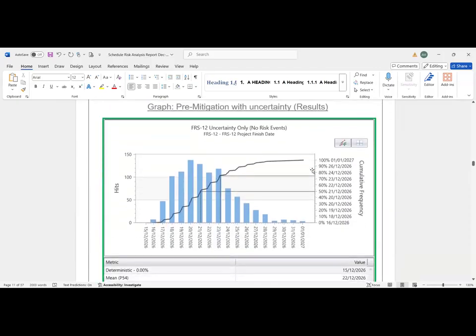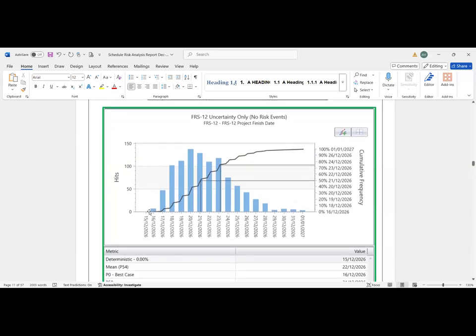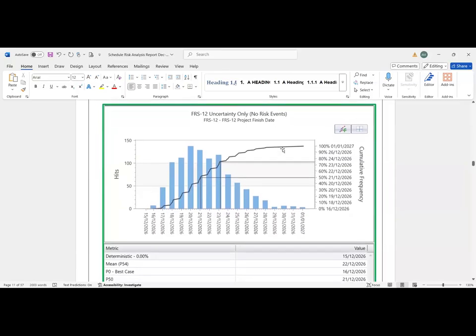After that, as Amar Bhai taught, we do Monte Carlo analysis. This is the analysis which tells us that in this much duration, these are the chances of risk. If there is 0% risk occurring, then it will complete on time. As the chances of risk increase, the duration of the project will also increase. This is the curve which Amar Bhai was teaching today.